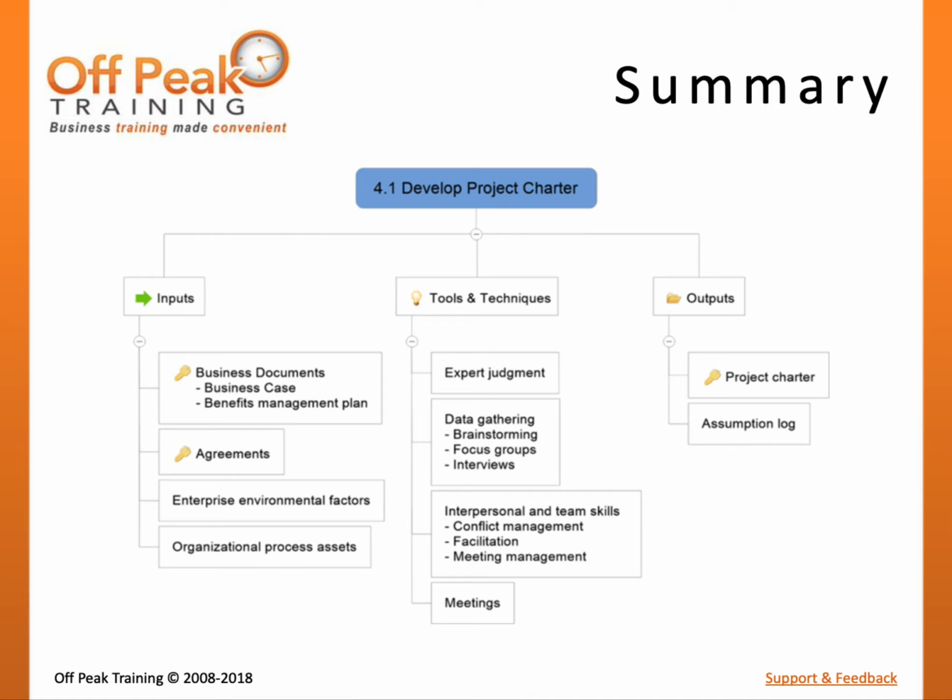To summarize, the purpose of this process is to develop the key output, the project charter, which will authorize the project and name and authorize the project manager. While the document may provide some descriptions about the project, all information in the charter will be at a high level rather than detailed. To help develop the project charter, it is useful to have a project statement of work or customer agreement to better understand the deliverables that the project is intended to produce, as well as a business case to help provide an understanding of why the project is being performed and why it was chosen.